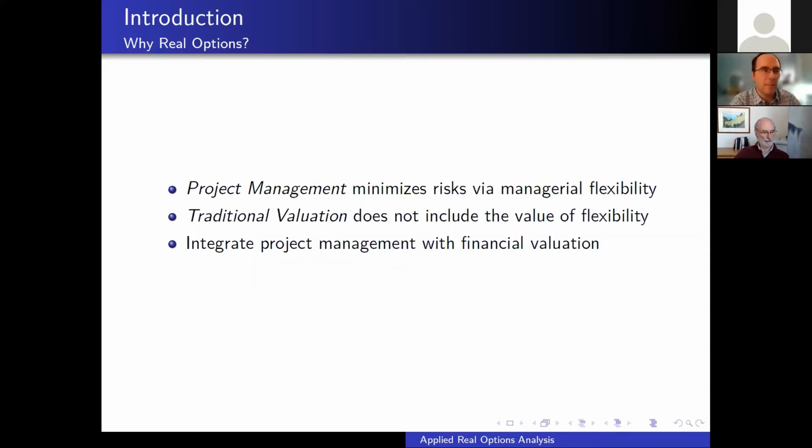To give an example that integrates with this real options talk, we were just looking at doing a 24-unit housing subdivision, and the permitting authority actually mandated that we would have to put in all the roads and all the site utilities and perform a significant amount of the site work prior to issuing any of the occupancy permits, meaning we couldn't sell any of the units.